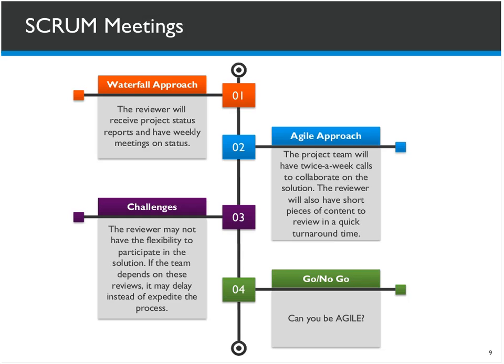There may be quick things that need to get reviewed by the reviewer in return to keep things moving. And that may be a challenge too. If the reviewer happens to be in another country, or in all-day meetings and doesn't have time, we would need to put things in place to have a secondary reviewer or somebody they can delegate that decision to.